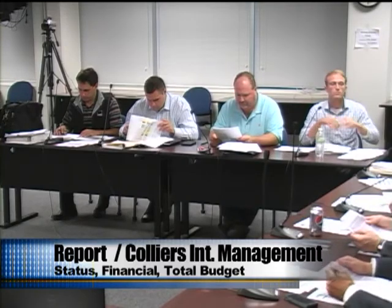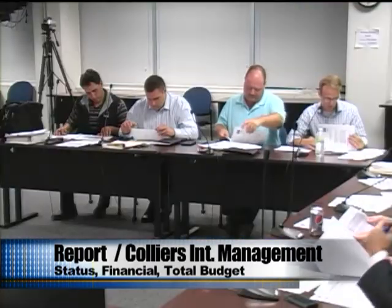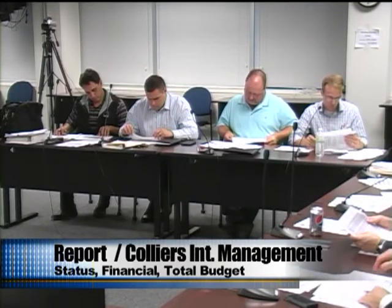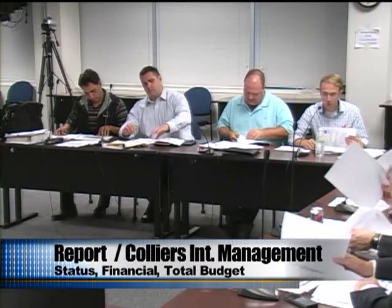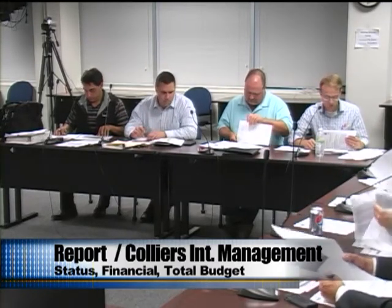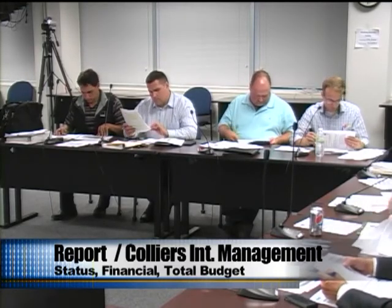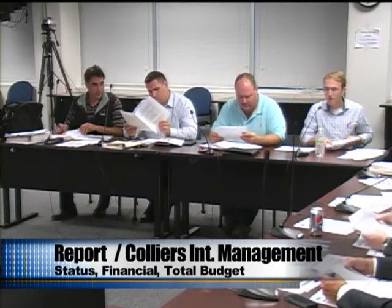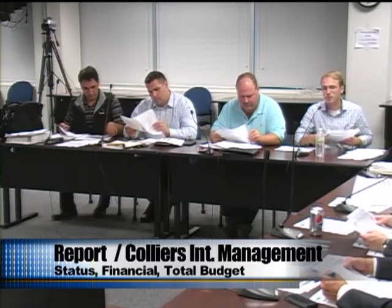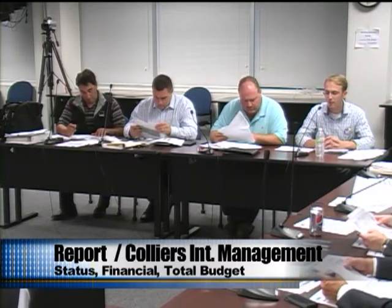Okay, I'm looking at Exhibit C, and it's got the purple background. Yeah, so if you look at the last row on that first page, and then you flip the page over to the next page, and you look at the rest of those down, those are the current pending open exposures that we have been tracking. Items 23 through 38. Yeah, and 37 and 38 are just there because they're just mumblings, and we really don't have a cost estimate for them, so just a placeholder for if it moves down the road further and we can get more of a grasp of it, then we add those in.